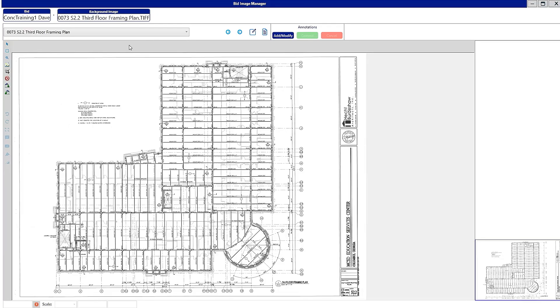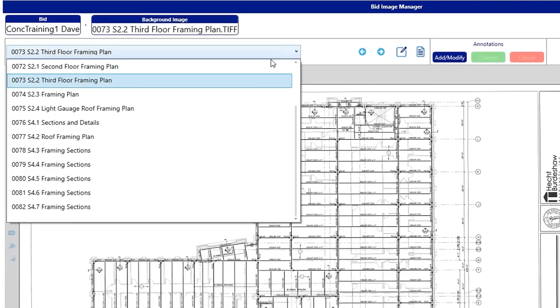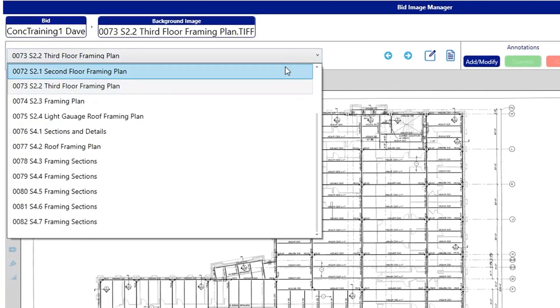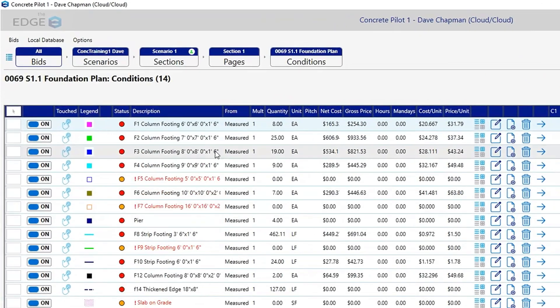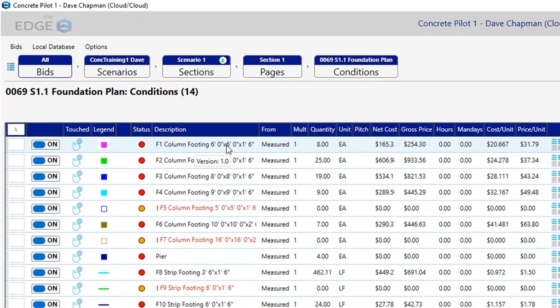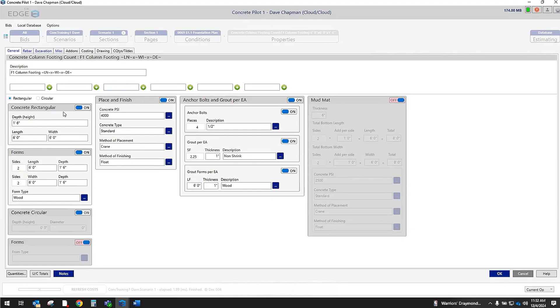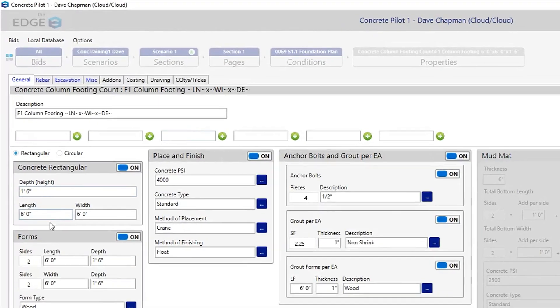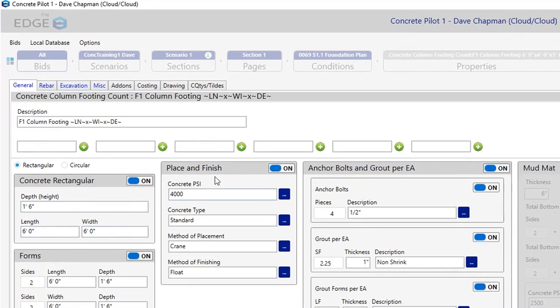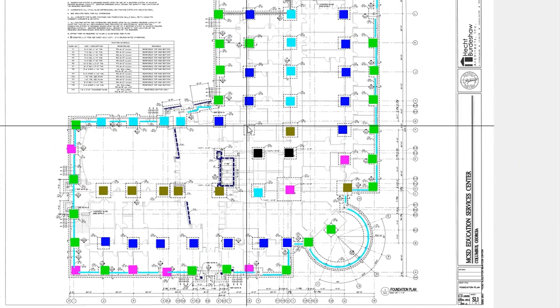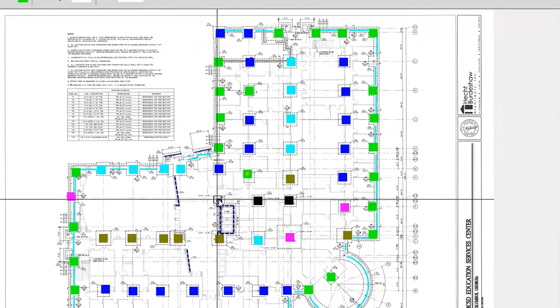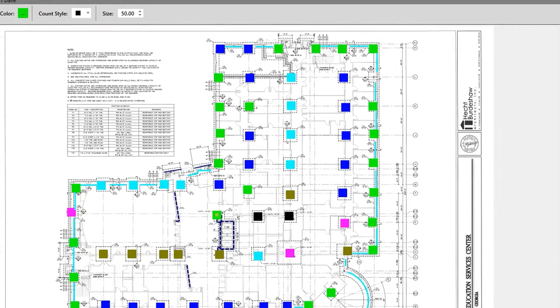With the Edge, you can upload your blueprints which will be stored in the cloud, build your assemblies specific to that bid using our detailed assembly templates, and measure them right on your screen. As you're doing the takeoff, your materials and productions are being updated in real-time.